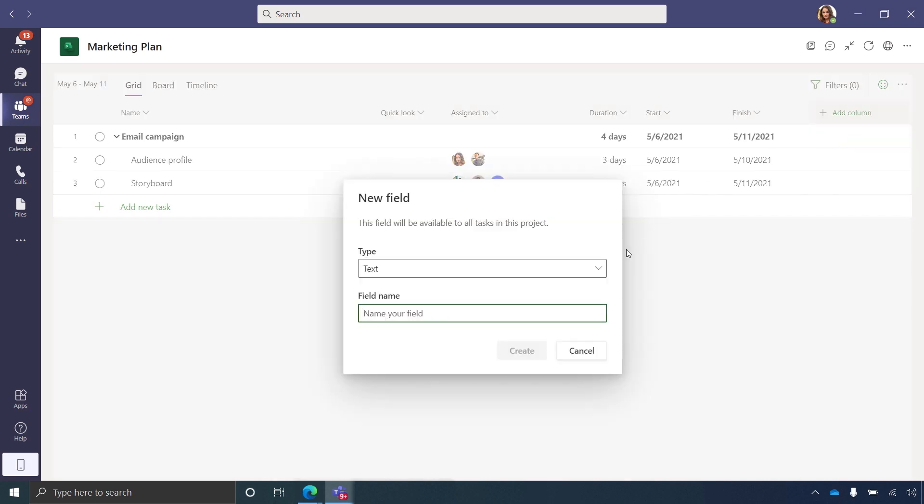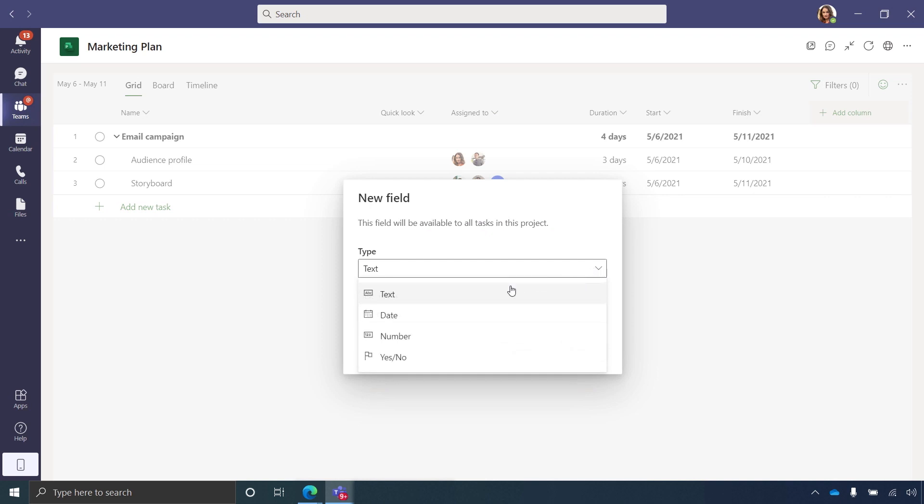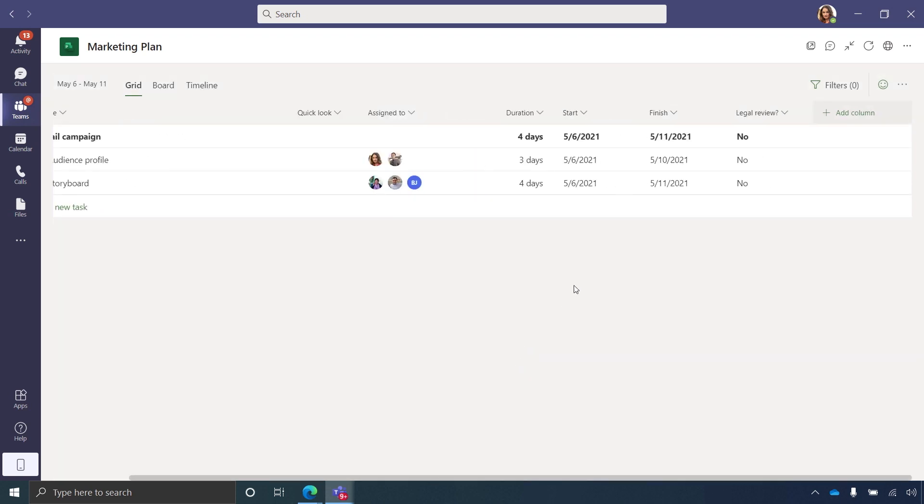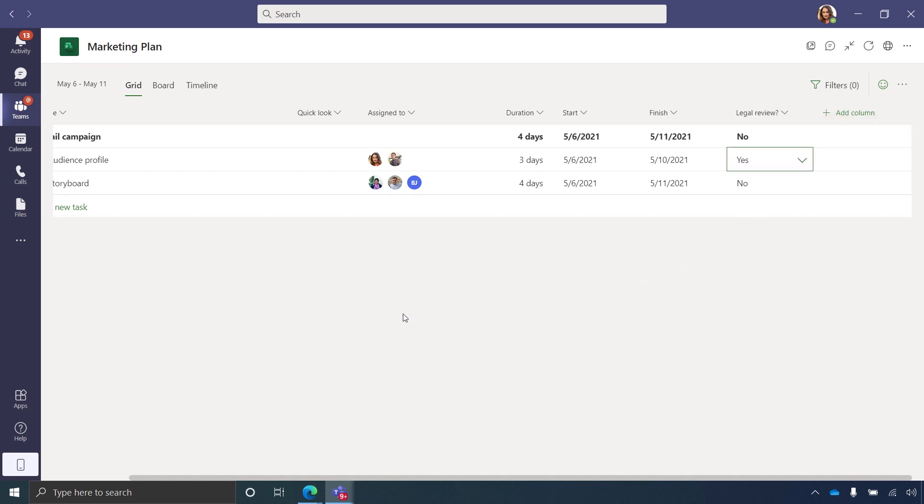the scheduling engine will automatically calculate the finish date for each task. From here, I can add additional fields, including custom fields. As I add a column, I can choose the data type. In this case, I'll choose Yes/No and give this field the name Legal Review and hit Create. Now I can assign yes or no to each of my tasks. That's how easy it is to set up your project.